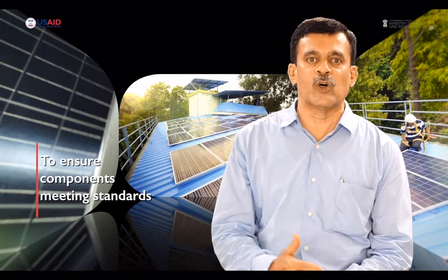The second thing would be, there are also standards that each component needs to meet, and there should be certificates. For example, for solar modules there are some standards, for inverters there are standards, for cables there are standards. You will need to see that the particular model used in the system is certified, and that the certificate is valid at the time of installation, because only then can you be sure that all the technical specifications stated in the standard are really met.